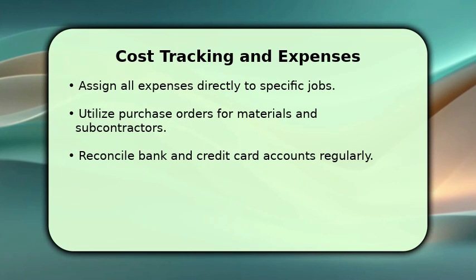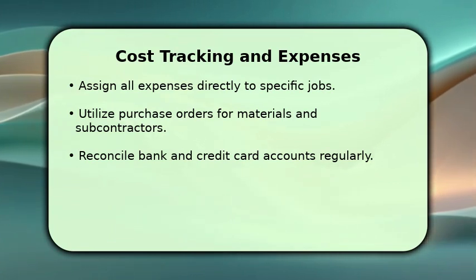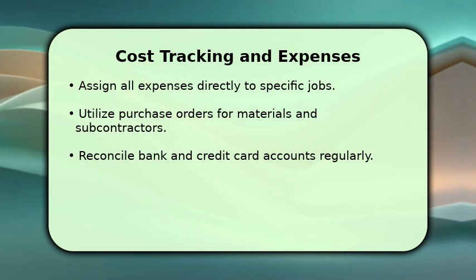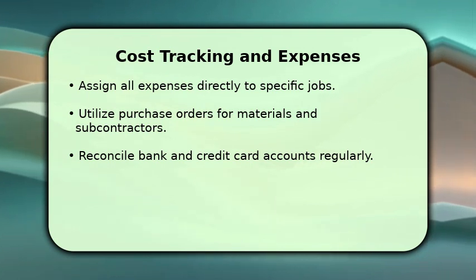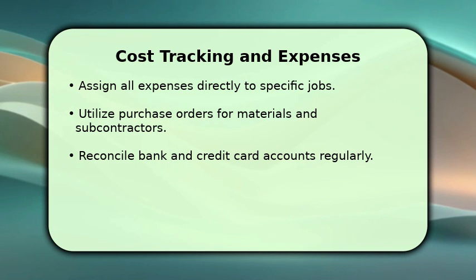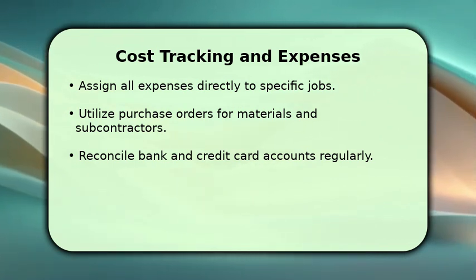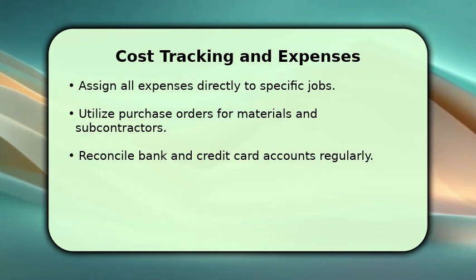Effective cost tracking is vital for construction. Make sure to assign all expenses, from materials to subcontractor fees, directly to their specific jobs. Use purchase orders for all material acquisitions and subcontractor services to maintain clear records.